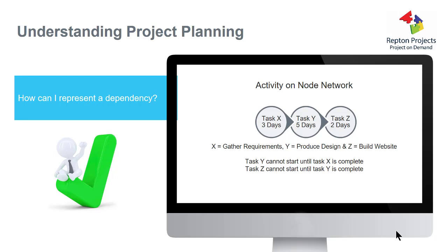I can build the website after the design has been completed, ideally, but you can also start building, I suppose, if you've got half the design. I wouldn't recommend it again, because yet again, if the design changes, you've wasted all your time and your money building something that you're going to have to redo. So I can't build a website until I've got a design, and I can't do a design until I've got the requirements for the project.